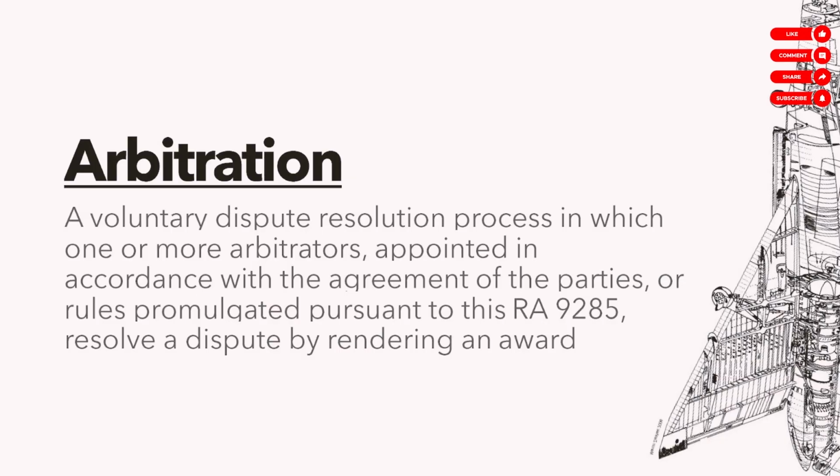Magta-try muna silang mag-resolve ng dispute. They'll try to resolve the dispute using an alternative method. And one method is arbitration. The way that this works is, mag-a-appoint ng arbitrators yung dalawang nag-aaway, and the arbitrators will listen to both sides presumably and then issue a decision. Sino tama, sino mali. Okay, that's arbitration.